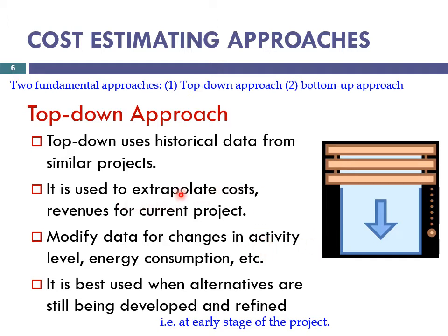By extrapolating. And this approach is best used when these alternatives are still being developed and refined. It means that at the early stage of the project, using a top-down approach is the preferred alternative, or it's better to use this top-down approach at the early steps of the projects.